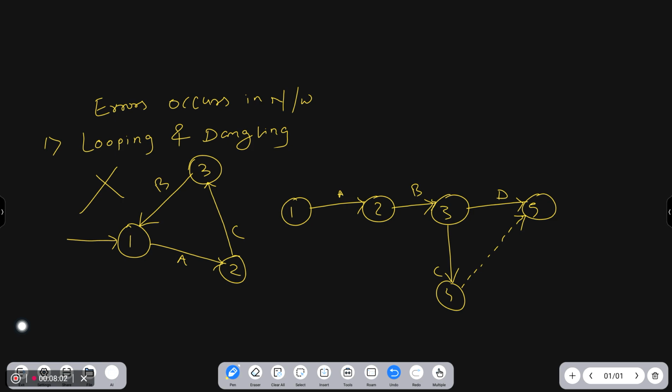Now it's okay. But we cannot open two outlets. This is the second important error that can occur. If such an error occurs, then you have to connect that diagram with a dummy. You know that a dummy does not consist of any resource, and it does not consider any time. Therefore, it does not affect my output in any algorithm, such as CPM. These two errors can occur.